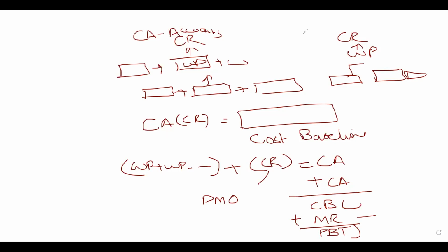If you want to know for the exam what the cost baseline is, the cost baseline includes only the contingency reserves, which are for known risks, while the project budget becomes what you get when you add the management reserve. The money equivalent to the management reserve will stay with the PMO and will only be released if an unknown risk occurs which was never mentioned, never defined, never invested, and will only be released with the help of a change request. So that was our mechanism of creating the cost.